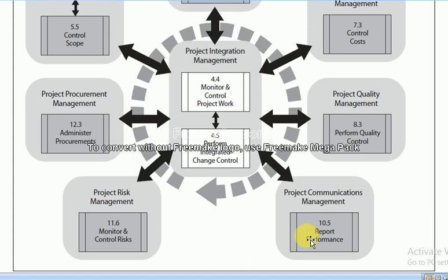Step 11 included in project monitoring and controlling is gain acceptance from the customers. Once the project deliverables are completed, they are presented to the customers and stakeholders. And if the deliverables meet the requirements agreed with the customers in the beginning, the customer accepts the project, and the closing phase is now triggered. After this we will apply the closing stage.